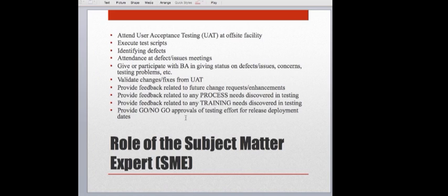So you know how I said if you've got a developer sitting in the room and they're fixing things right away, they do a build to the environment? I've even had that happen where, like I talked about, at the end of the day that night, we'd move the new code into the environment, and the next day they would test it. Depending on what's going on, it could be that when they take their lunch break, we actually move new code in so that afternoon they can do more testing. So there could be changes made literally during UAT.